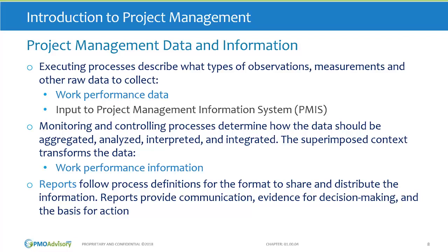The work performance information is actionable and the basis for decision making. The work performance information is communicated in reports, and the reports are distributed according to the communication plan for the project.